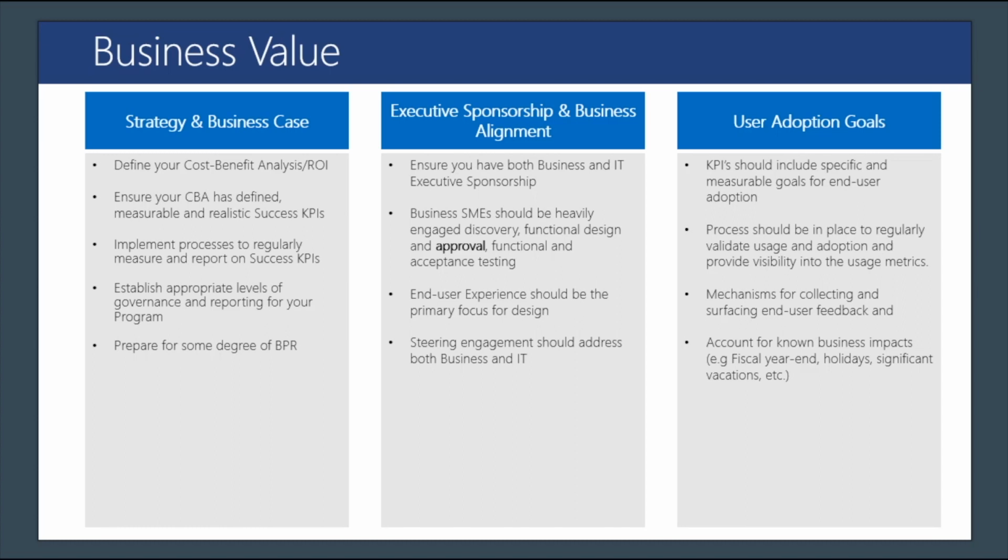One of the things that really kills a CRM implementation, and I've been doing CRM implementations for over a decade, is that the executives define these KPIs, and then they say, okay, in 6 months we expect to see a 15% increase in productivity, and we'll measure that by more opportunities per month, as an example. And they get to the 6 months and they look at the metrics and they're not there.